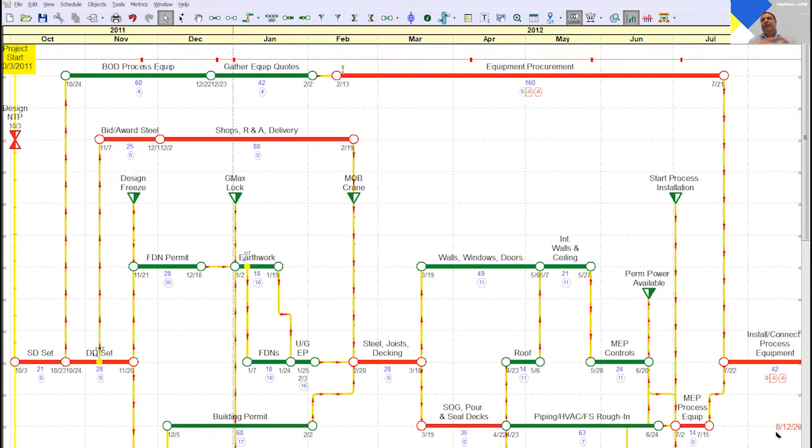So if at any point that schedule was in NetPoint and then exported into P6, it will remember that positioning at that point and will always bring that back in. It might not bring in all the layouts. It only remembers the current positioning.